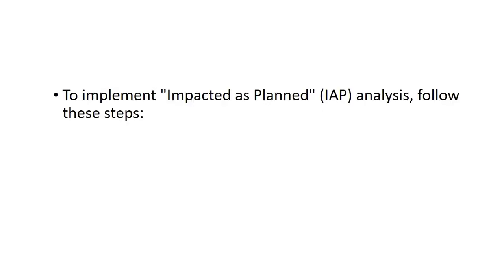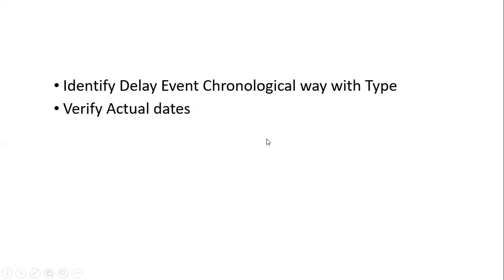To implement this analysis we have to follow certain steps. The first one: identify delay events in chronological order with time. We have already studied there are different kinds of delay events - excusable, non-excusable, concurrent, compensable, and non-compensable.